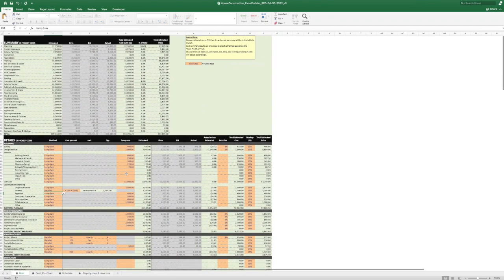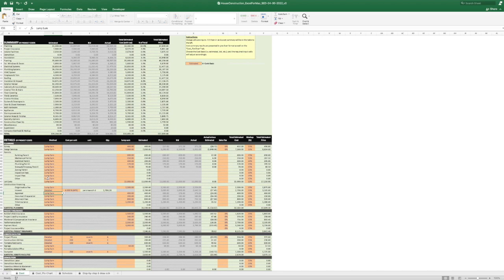And again, the only places where you input something is in the orange cells. You can use this in the beginning when you just want to estimate how much something would cost. Then if you get something more firm from a subcontractor of yours, you can see how the cells will adjust as you select that option here. These will gray out and let you know this is now summarizing what's in this particular column here. So now these become orange,